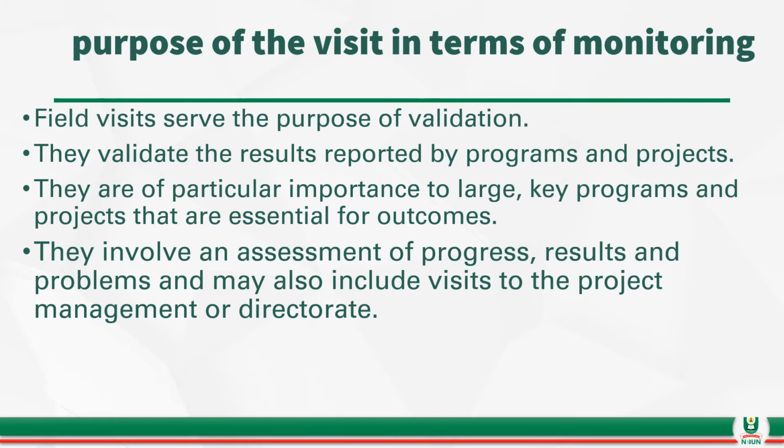What are the purposes of field visit in terms of monitoring and evaluation? One, field visits serve the purpose of validation. That is, what you have proposed to do in a program, what the organizer or the sponsor of the program have decided to do. During the field visit, you are going to validate if what you planned in one cubicle, one office, is actually going on. So they validate the results reported by programs and projects.